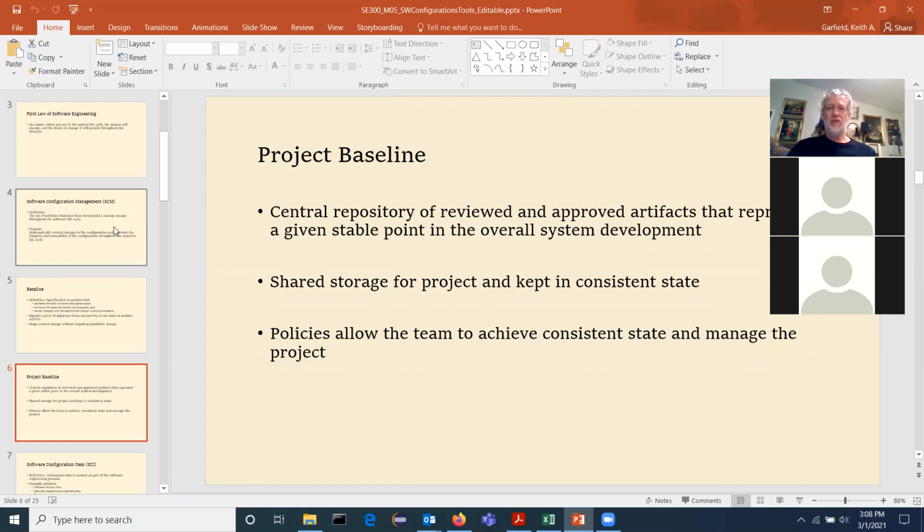So if you're in a contract and they're saying, oh, you have to test to this industry standard, your question really needs to be, make sure in the contract they're specifying which version of the standard. Because if you run all your tests per industry standard version 12, and they contractually wanted version 13, you haven't met your contract.